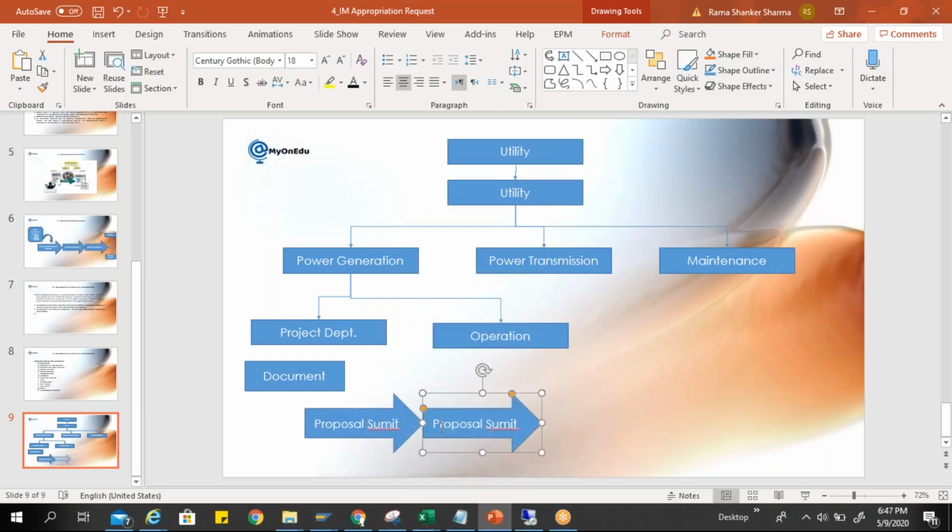Second, let's understand technical feasibility. When I'm checking the technical feasibility, as I said, as per my experience I have two options here: whether we should go for the new power station construction, or work out how to modify the system to increase the efficiency of the existing system. So I'll have two scenarios within the system for the same appropriation request, based on a separate object which we used to call a variant.